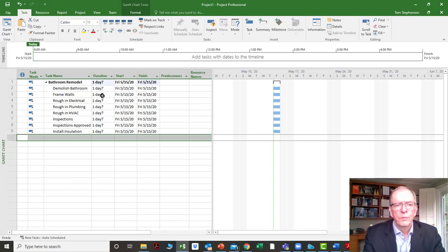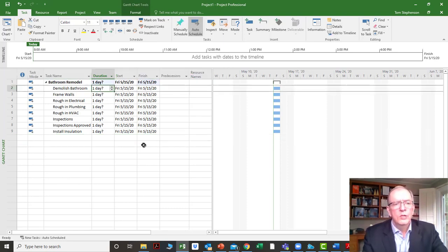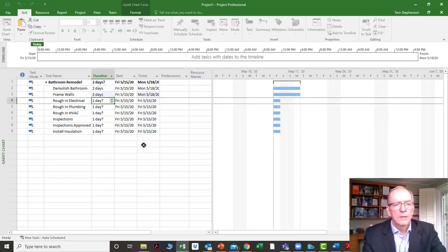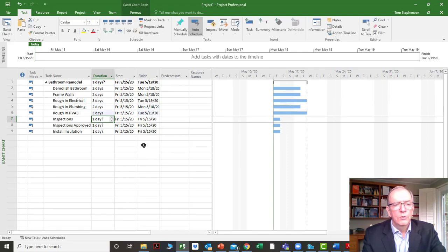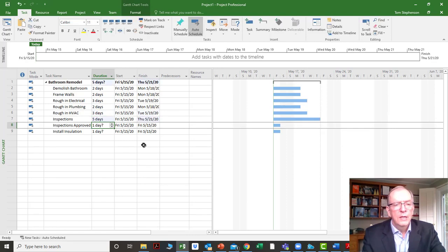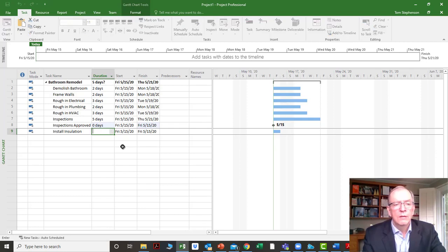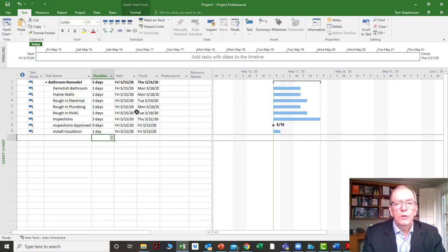So I'm just going to quickly put in some durations here just to mix things up a little bit. We'll assume it's a big bathroom, so we'll make them a little bit longer durations than they probably would be. I'm going to allocate 5 days for the inspections to take place. We talked about milestones, 0 duration. It'll give you a diamond signal if you do the 0 duration here. And then install insulation, I'm going to put down as 1 day. Okay. And so they're all listed, but they're all starting on the same date. They're starting on today's date.